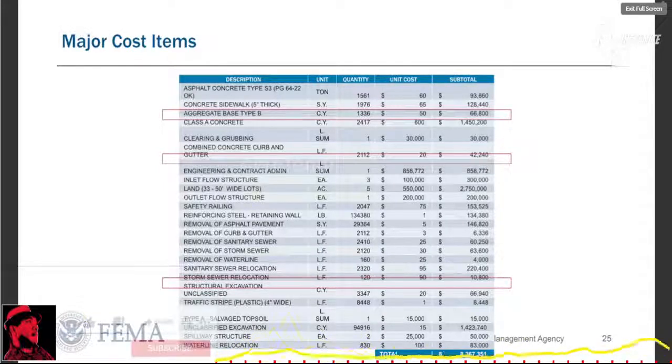Okay, when starting a cost estimate review, and this is a table of that, it is good practice to start with evaluating the major cost items within the cost estimate. And you'll see there are three areas that are underlined. The cost estimate shown here has those three items that each exceed $1 million. And collectively, they represent 66% of the project cost. So when you see that, you want to look at your scope of work, the schedule, and any drawings or plans that support those items.